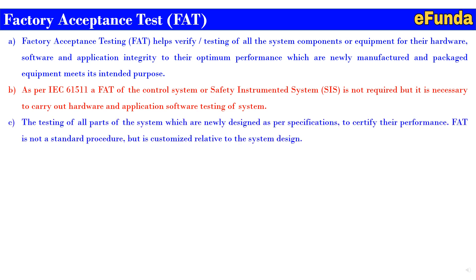The testing of all parts of the system which are newly designed, as per the specifications, is carried out to certify their performance. FAT is not a standard procedure but is customized relative to the system design, where the goal is to develop the procedure with the help of the customer and execute a series of tests with proper test equipment prior to release and shipment of the system to the customer's location.